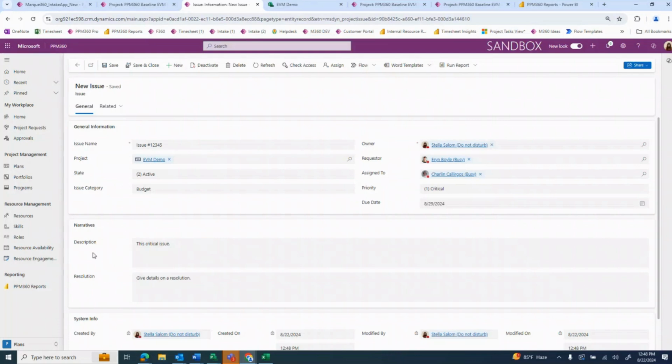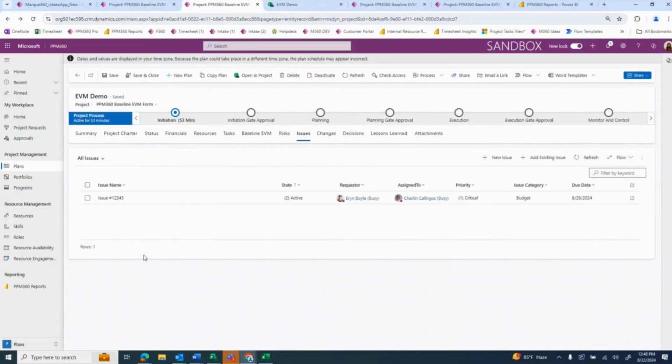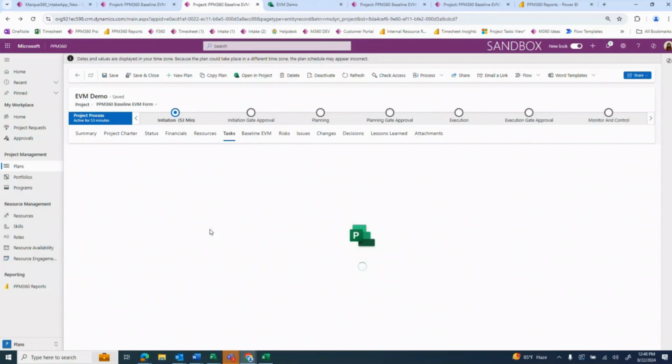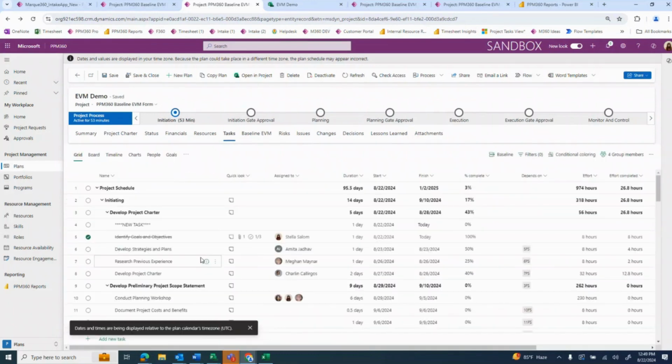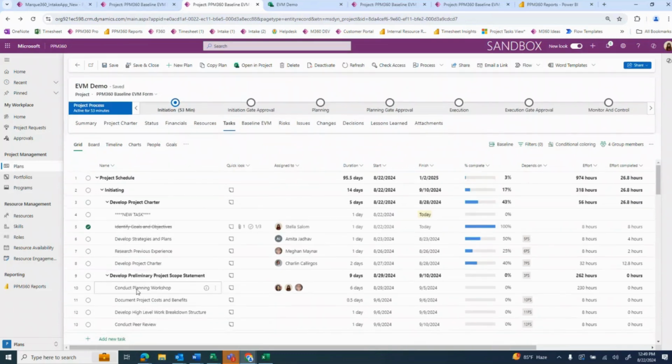So is there a feature to allow resource time entry against a task? Yes. So do you mean the resource themselves entering the time? Yep, I'm coming off mute. Yes, the resource themselves. Let's say we scheduled 20 hours. That was in the baseline, but when the task was complete, let's just say it was like 30, right? So you'd be able to see that difference and know that, yeah, now you're at a cost overrun, but you're looking at the actual spend against that task. Yes.